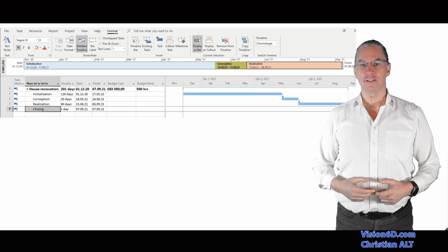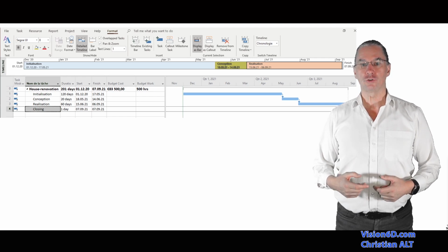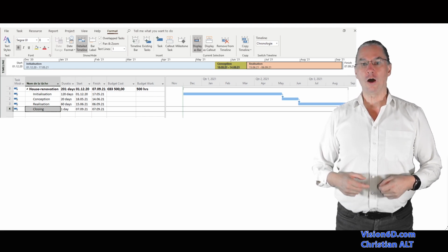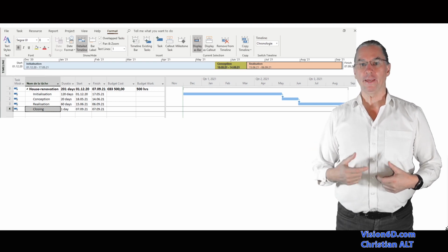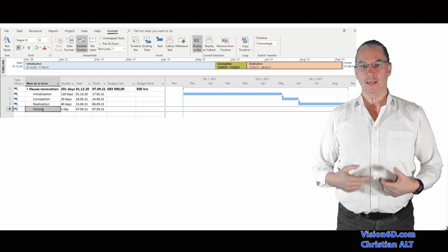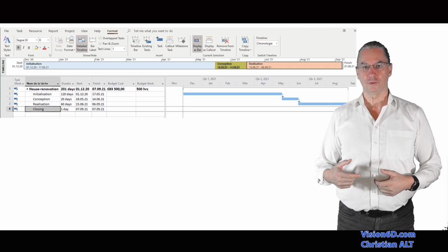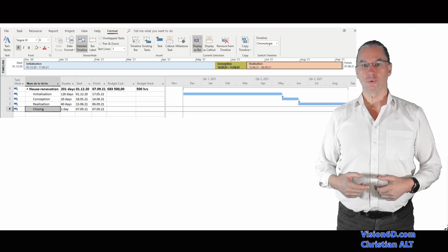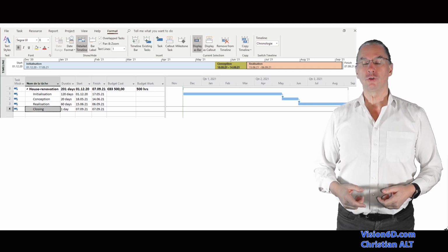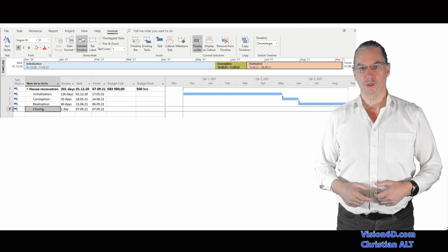This is often the case when you have internal resources. In that case, certain companies like to have the information of how many work hours my co-workers are involved in this project. For some other organizations, you see that they just want to have an information about cost, and they are going to convert the work into costs and add it to the normal cost of the project.